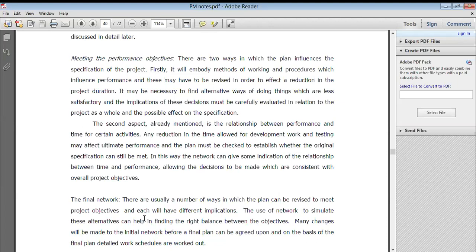So whatever work you have started, you just check whether it was done correctly or not, whether the quality of work is there or not. Approval is required. So when A's work is finished, the team manager or the project manager gives the signal that yes, your work is done, now B can start. Without approval you don't start.